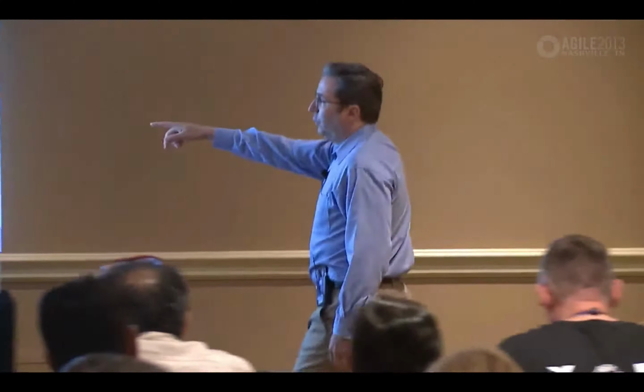The green times represent value-adding work. The times that the team is actually doing value-adding work, meaning the batons are moving. Green, baton moving. Red, baton on the ground. When you do the math, sum up all the greens and the reds in that picture, there's 6 weeks of value-adding work time. There's 39.4 weeks of total cycle time, right? End to end across, 15% process cycle efficiency. So the batons essentially are on the ground 85% of the time in this picture, because only 15% of the time did we actually do value-adding work.